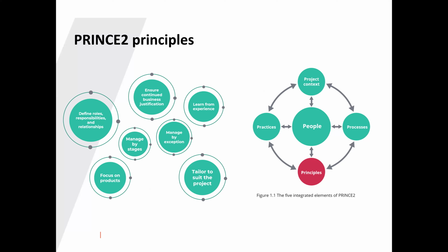And that is why one of the first documents you want to build as a PMO person on a project or as a project manager is what is called the lessons learned log. You want to ask, do you have a lessons learned log that we can learn from, about what has happened on various similar projects in the past? And also, as a project manager or PMO person, you want to develop your own log so that you can start documenting the lessons you're learning.